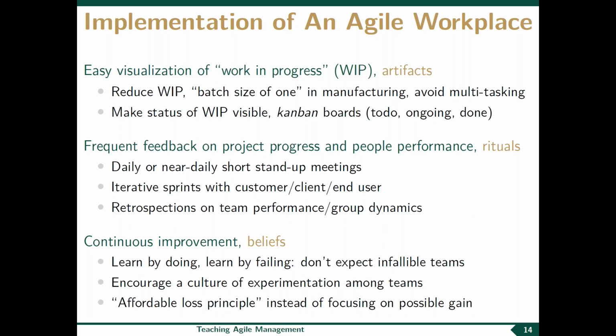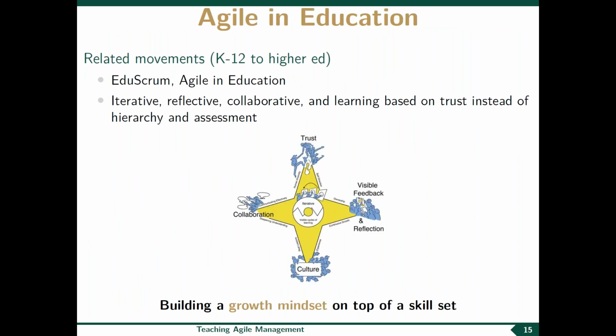If we do something wrong, well, we only did it wrong for one sprint, and we realized it at the end of the sprint that this was not the right way. So we've only lost one sprint. If we think back about the waterfall process, if we realize at the end of the process, at the end of the project, that we did something wrong, well, we've lost a much longer time period.